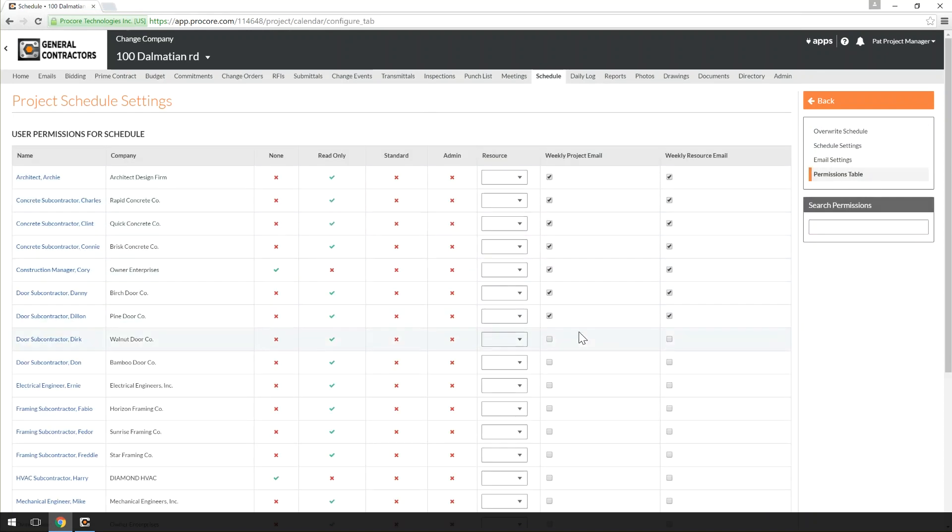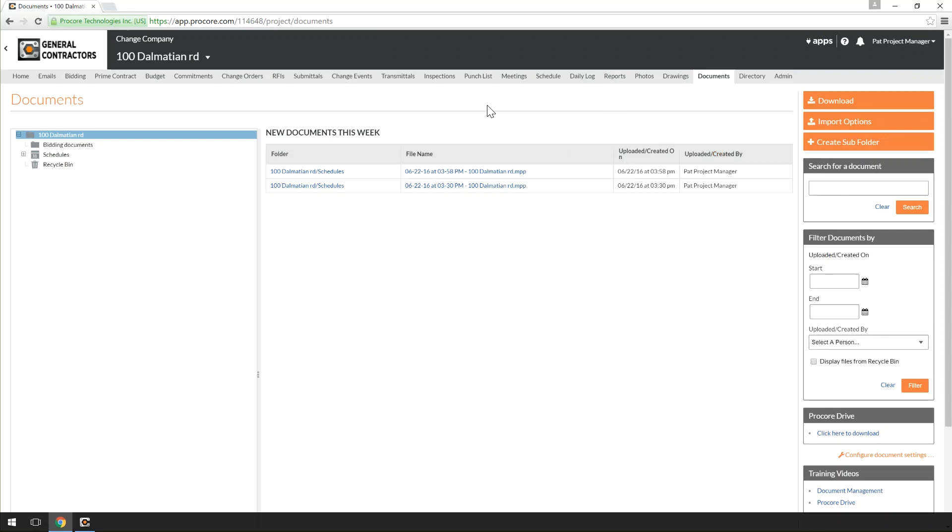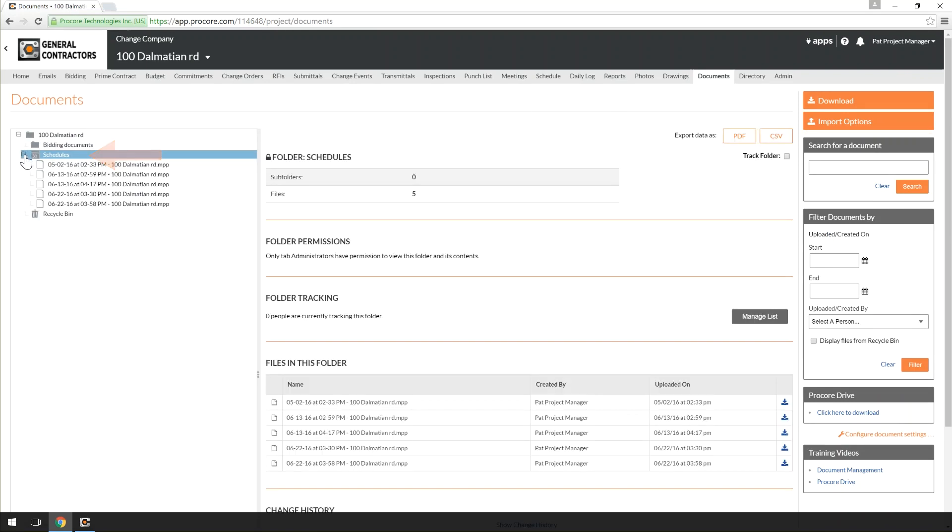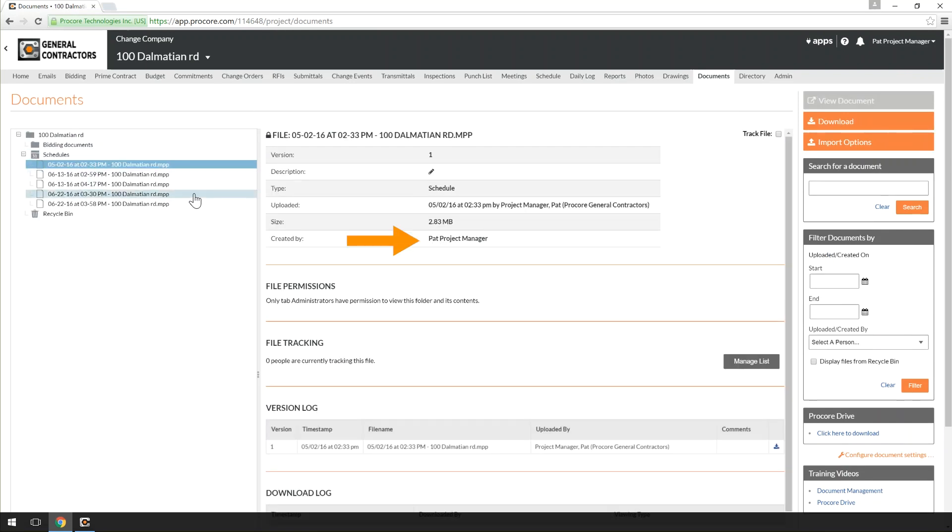Whether you're uploading via Procore Drive or not, every version of the Schedule gets saved in Procore. You can find each version in the Documents tool under the Schedule's folder. In this folder, you can see who made the change and download previous versions of the Schedule for reference.